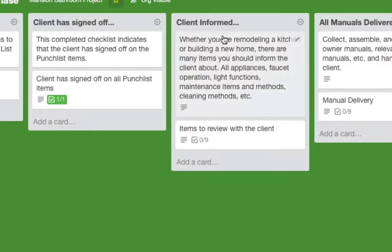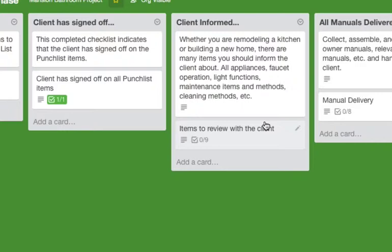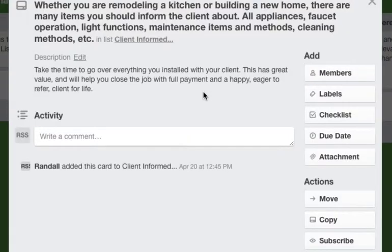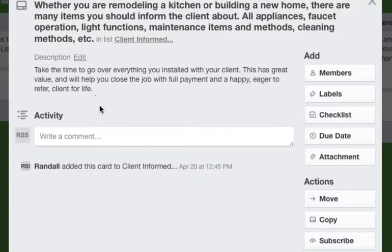Client informed: whether you are remodeling a kitchen or building a new home, there are many items you should inform the client about - all applications, faucet operation, light functions, maintenance items and methods, cleaning methods, etc. Take the time to go over everything you installed with your client. This has great value and will help you close the job with full payment and a happy, eager to refer client for life. Very important.